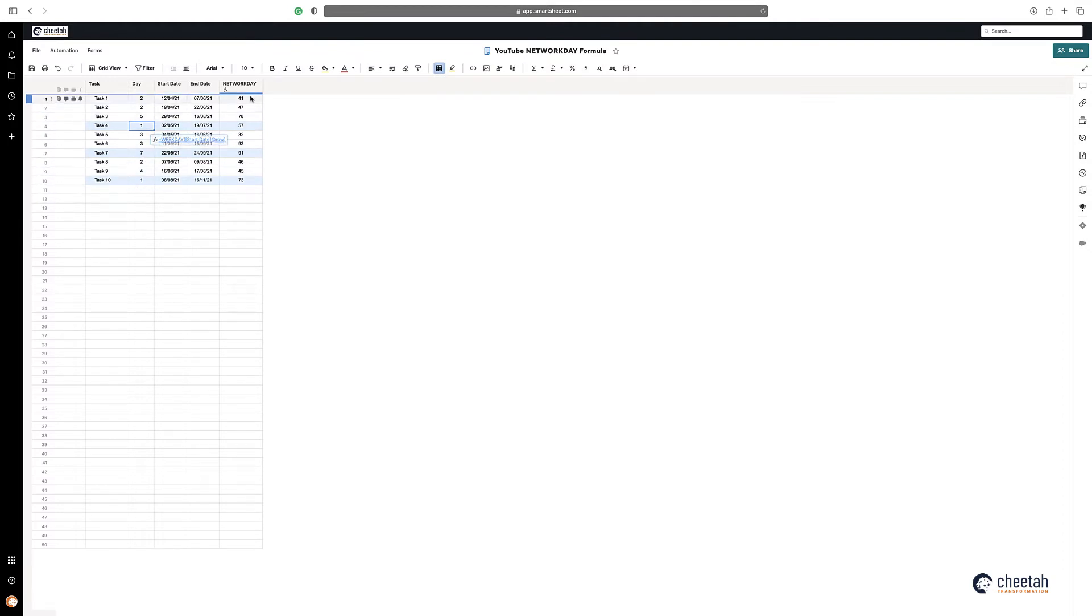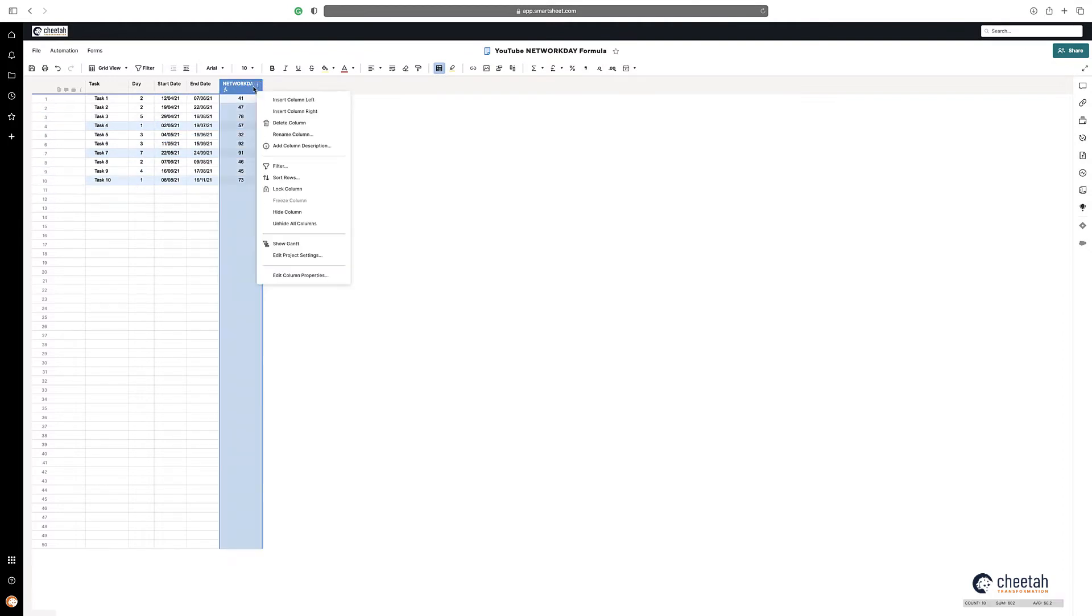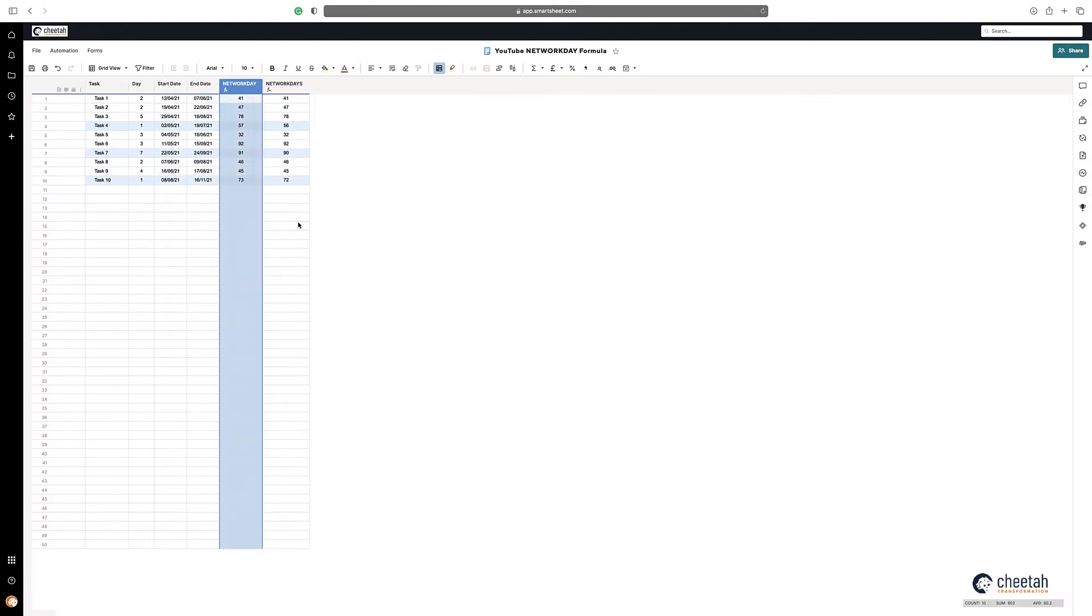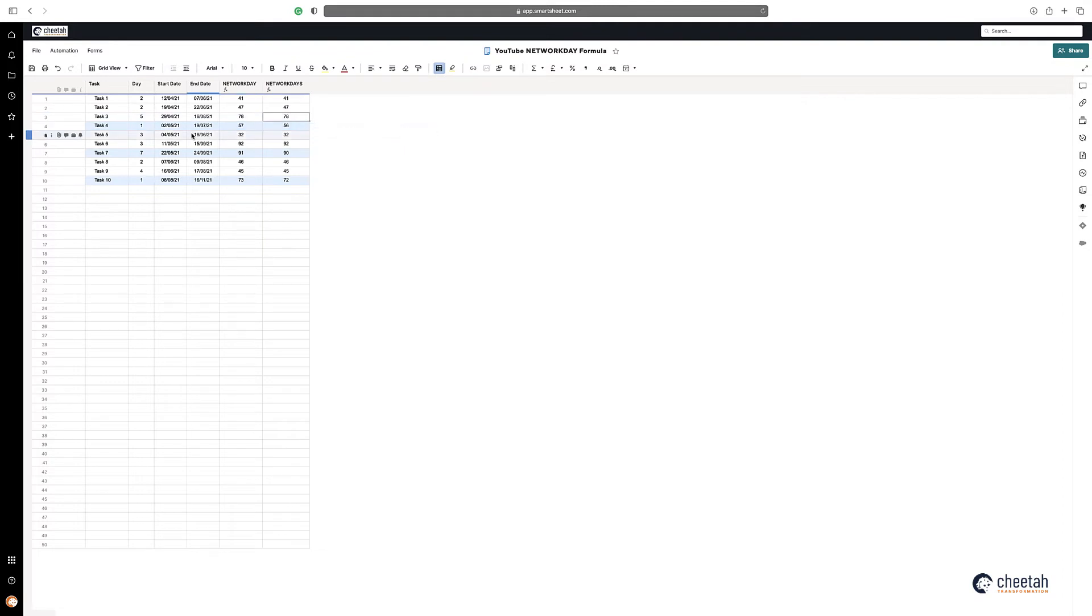So if I just unhide this column here, you can see I've got NETWORKDAYS here, and NETWORKDAYS all that does is actually calculate the number of working days between two dates. It doesn't mind whether or not it's on a Saturday or a Sunday.